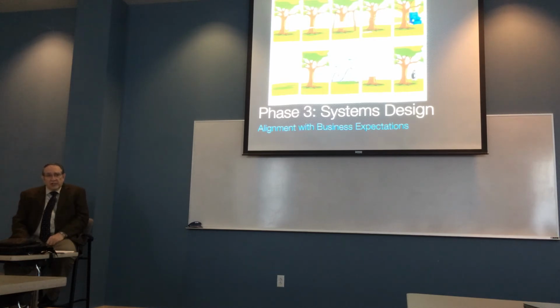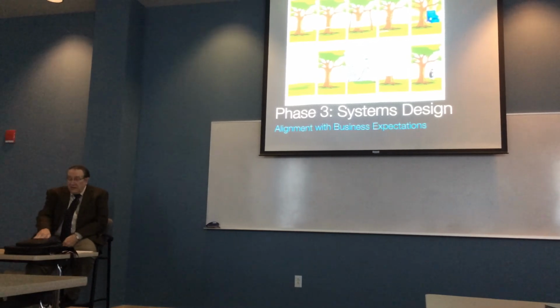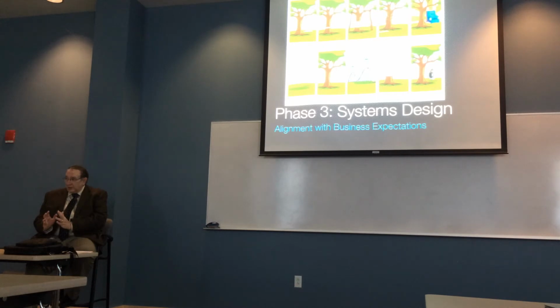And on large projects, one of the things I was noticing was down at Fidelity, looking at their process with them a couple of weeks ago. When they're in this stage, they're doing vertical prototypes that cut across the entire system. So yes, they're looking at the UI. Yes, they're looking at the database and how it works. Yes, they're looking at the deployment and doing a full vertical slice to make sure all the pieces will play together. It isn't really that hard to do.